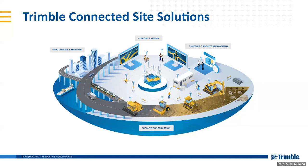I think, again, Jan, I'm able to answer the question in that as you're building up your program of data, you're able to load in your different material types. Is that accurate? That is very true. You can build a materials library in Trimble Stratus and assign material types to different stockpiles. And in your report, you will see the volume plus the amount of tons, the mass, plus the value, if you also specify per ton. That's how you can set up your quantities in more detail in your report, with the totals per material type. Yeah, and again, Paul, what we can do is work with you to show you how to use the software so that you get maximum use out of this as well.